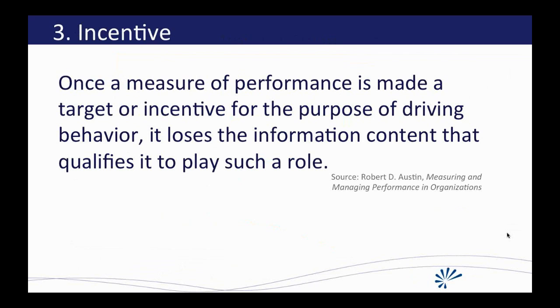And that's an important aspect to this. What do you suppose started happening to my customer where that happened? All of a sudden, we no longer saw plus or minus 20%. They were all right in the middle, which means velocity was not a good indicator anymore for them. It didn't allow them to inspect and adapt properly because velocity was no longer value neutral. And that's the key thing for the circumstantial metrics on the left. We want to keep them value neutral. We want to make sure that everybody realizes these are not indicators of value. The things on the right are, and so we want to keep them neutral so that we can adjust them and see what they really are.